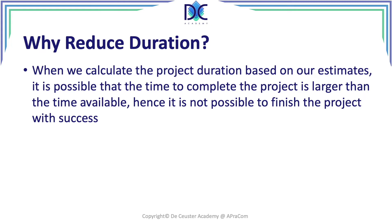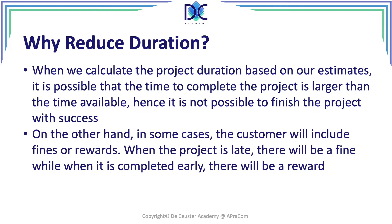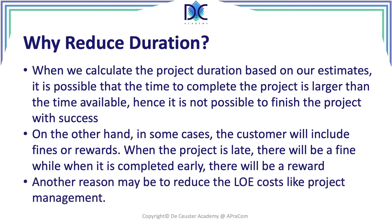Reducing the duration of the project will help us to finish the project successfully. In some cases, the customer may include fines or even rewards. When the project is late, there will be a fine to pay, which depends on the time that we exceeded the allowed duration. On the other hand, when we finish the project earlier, we may have a reward, and we have to take into account these elements when we are estimating the cost of the project.